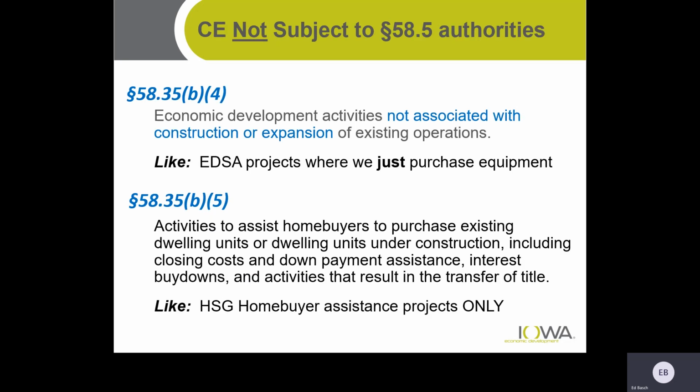So not subject to, they are, for example, an economic development activity not associated with construction or expansion of existing operations. For instance, just the purchase of equipment, purchase and then installation of the equipment, but no construction, no expansion, no renovation, rehab, and such, no physical work. Or in terms of housing, activities to assist home buyers to purchase existing dwelling units, including closing costs, down payment assistance, interest buy downs, or activities that result in the transfer of title. Now again, these are things that have no impact on the environment.